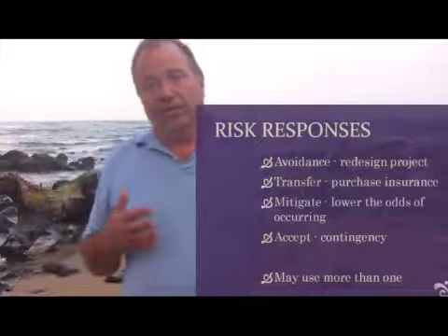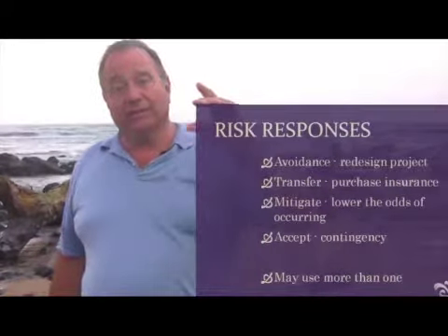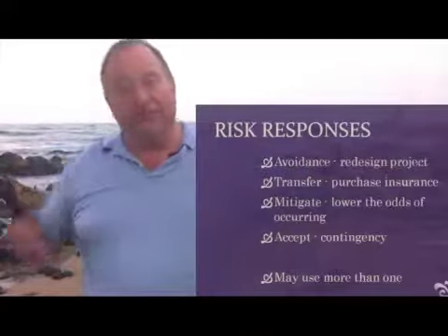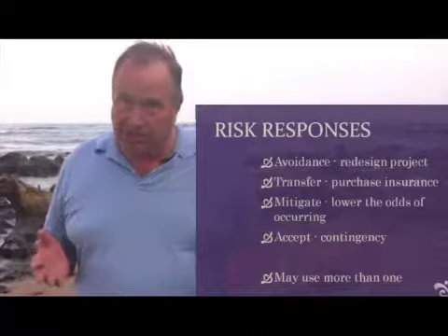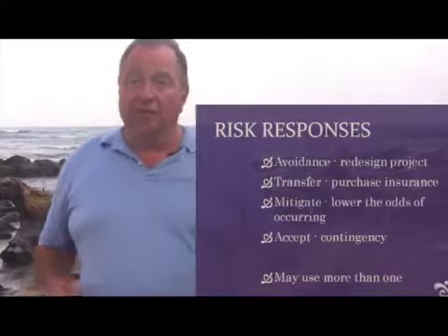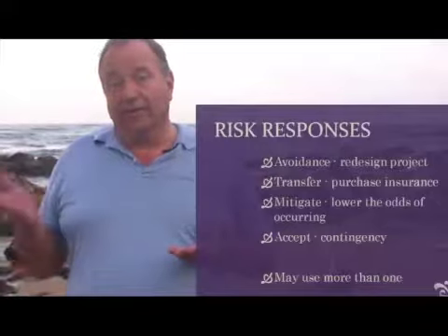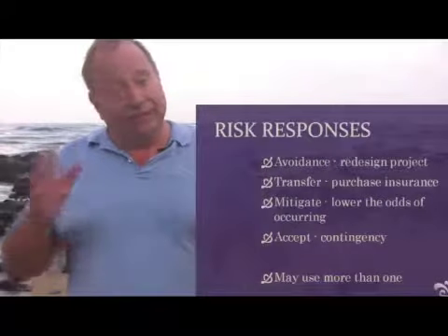So that's another way we try and avoid the risk. We can insure against the risk by shuffling the risk off onto somebody else, and that usually costs us money. But we have to evaluate the cost of contracting out for it, as an example, versus the expected value of the risk. That's our second strategy.